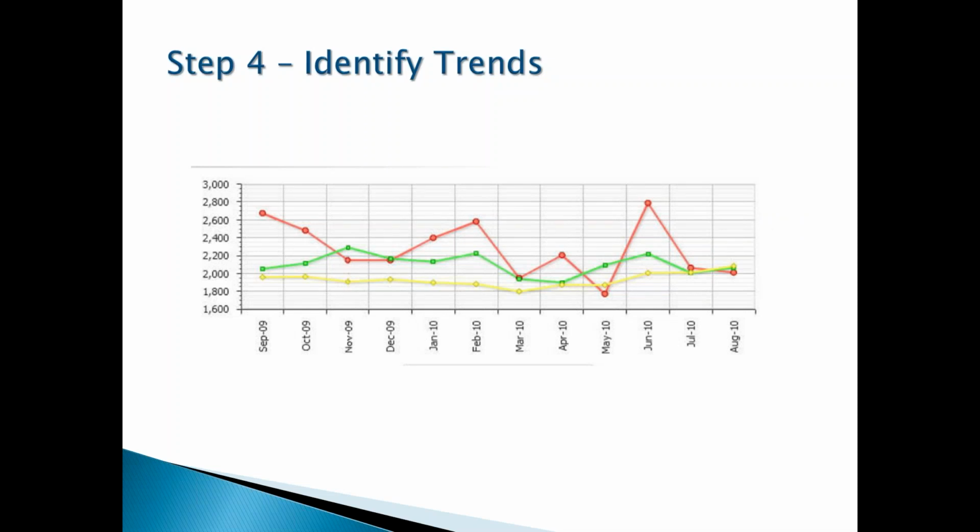Well, let's finish up with identifying some trends, and I'm going to once again use your spreadsheet. You can do a lot of what I'm going to show you in this section just utilizing a spreadsheet, maybe adding some charts to identify trends with your project. It's one thing if a project slips 1 month, but if it's consistently slipping on the critical path and the end date's not moving, or the end date is jumping back and forth, or there's constant resequencing going on, that's a good thing to know.